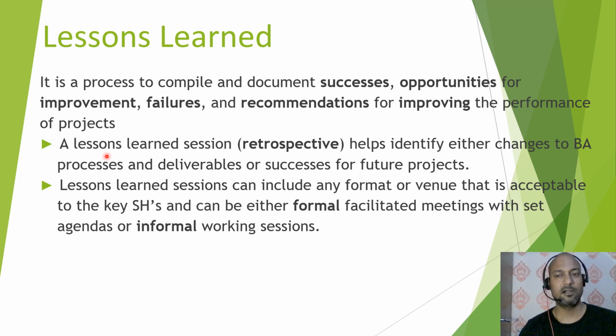I hope you all are following the sprint ceremonies, where you go through sprint planning. There are Scrum activities. There is one activity, the sprint retrospective, which is also a lesson learned. There you discuss what went well, what went wrong, and what the areas of improvement are. You try to note down those action pointers, and you try to work on those in the next sprint. So it is similar, nothing different. It's the same lessons learned process.